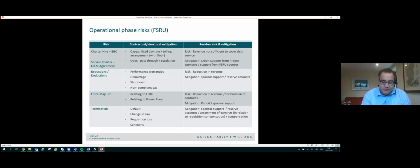And in the event that the FSRU sends out regasified LNG that does not conform to the agreed specifications, then provided the LNG that was loaded on board the FSRU was not off specification itself, the FSRU sponsor will again usually have to accept some liability for losses incurred by the project resulting from the production of such non-conforming gas, including the cost of the LNG that was regasified. And while certain reductions in the charter rate for deficient performance are largely standard, the lenders will look closely at each of the circumstances where the FSRU sponsor may be penalised on a case-by-case basis, and will ultimately take a view as to whether the nature of the risks and their potential amounts are acceptable or not.